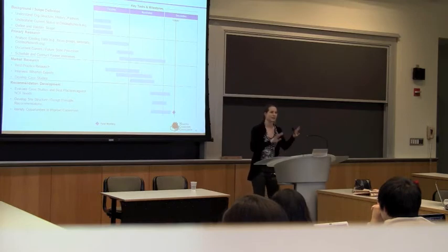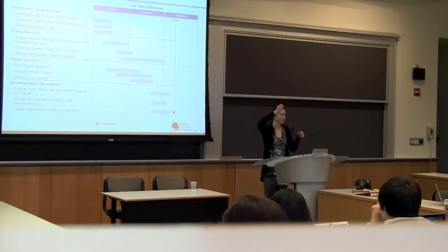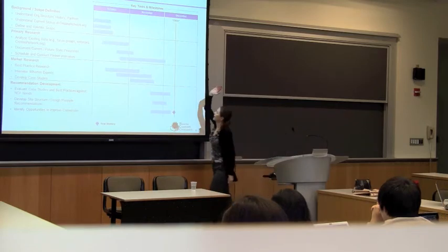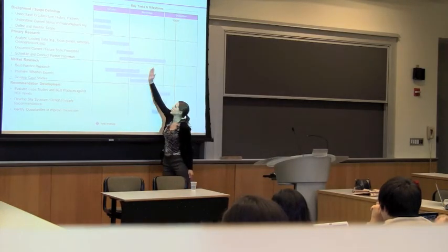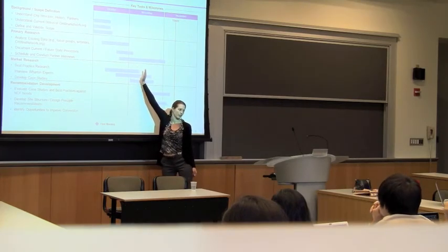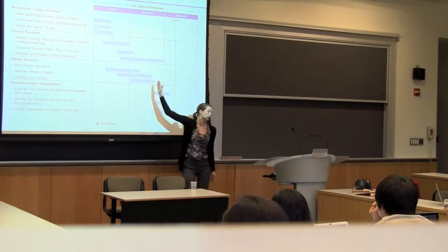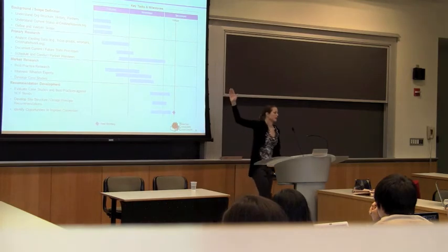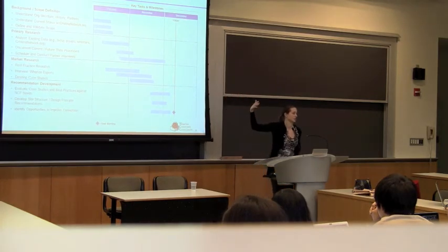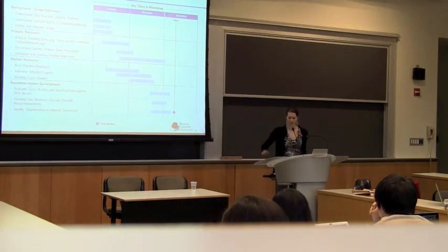You can just tape this up. You guys probably have a project lead structure in the project members. Your project lead can have it in the team room, or however you're structuring this, and everyone can know that, okay, you're going to have 3 weeks here, and by the middle of the second week we need to have this done. Or we're totally off schedule and we need to talk about exactly how this changes what we'll be going to do by the end of the 3 weeks.